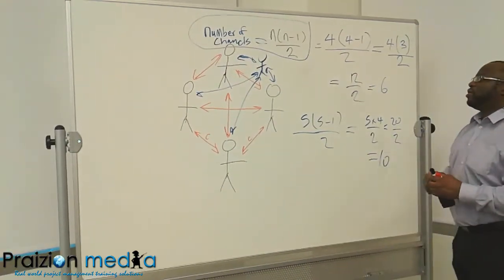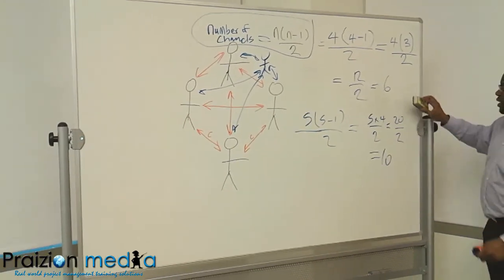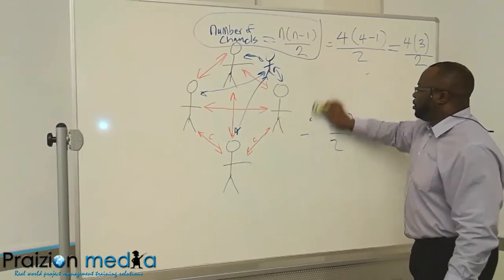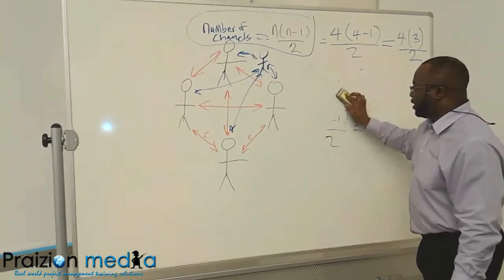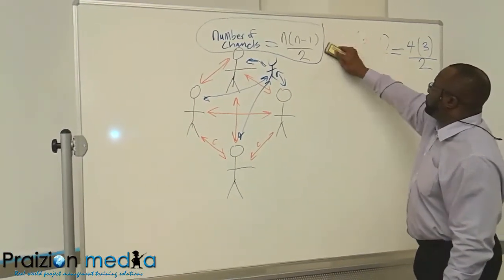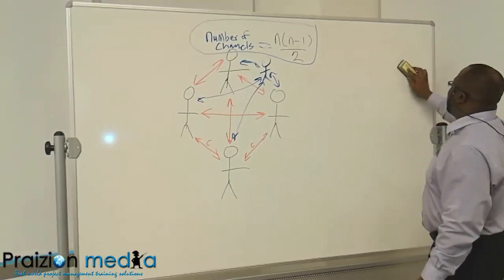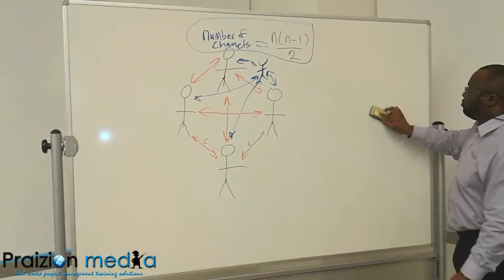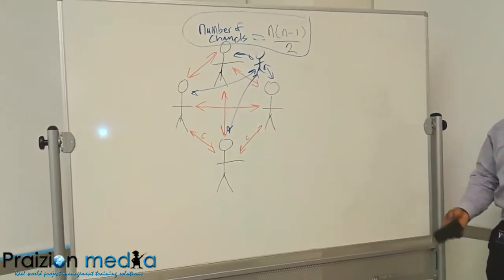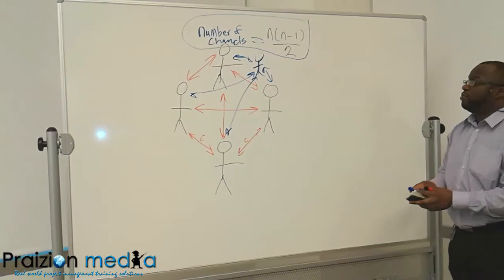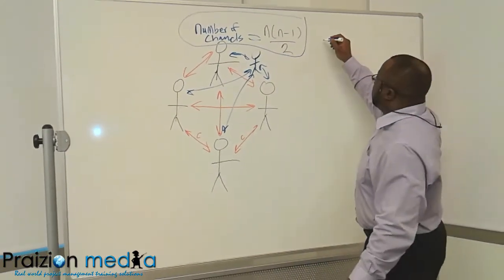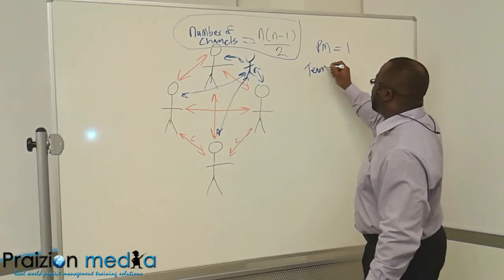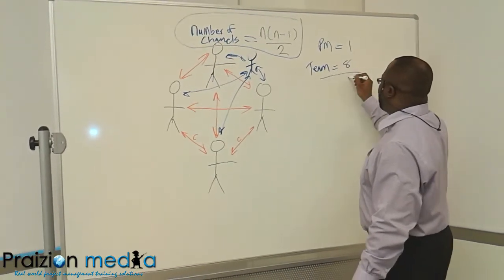Now, on the questions that you may encounter in many mock exams or even on a real exam, they may say you are a project manager on a project managing a team of 8. Watch out for the subtleties. The project manager is one person, the team is 8 people. Altogether, you've got 9.